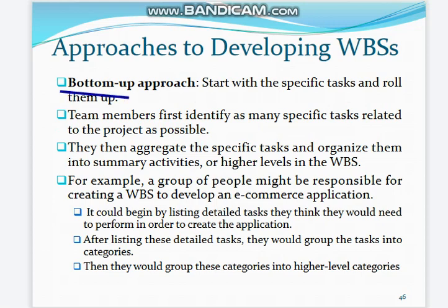Next is bottom-up approach. Bottom-up approach starts with the specific tasks and rolls them up. Team members first identify as many specific tasks related to the project as possible. They then aggregate the specific tasks and organize them into summary activities or higher levels in the WBS.